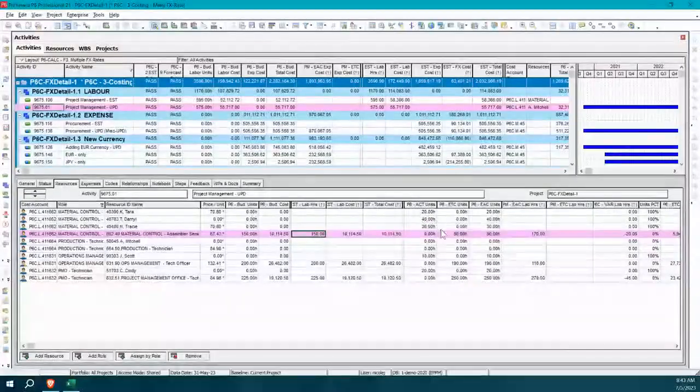We need these 4 to work together. Okay, so that's something we've tackled with this calculator add-on. It's going to work together so that the estimate at completions will work properly, automatically. That's the key here. So the only part that's not automatic is the project manager. We need somebody to give us what is left. So that would be the estimate to complete, or what is left in total, the estimate at completion. We need somebody to let us know what that is.